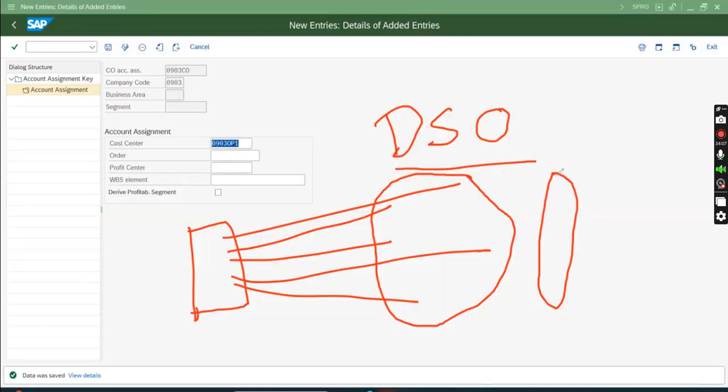And after that, once a code is created, the PMO will transfer all the time from the temporary code to it. So the temporary code can be an order or WBS, and once this transfer happens, it hits the cost center.